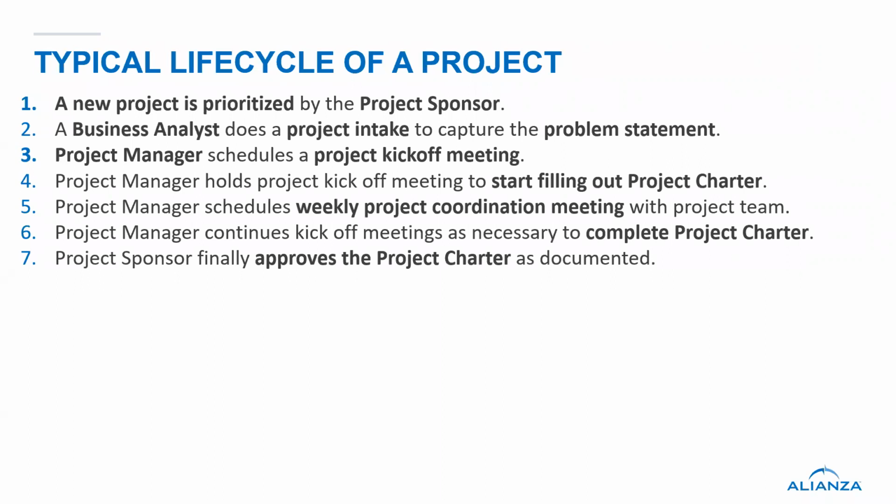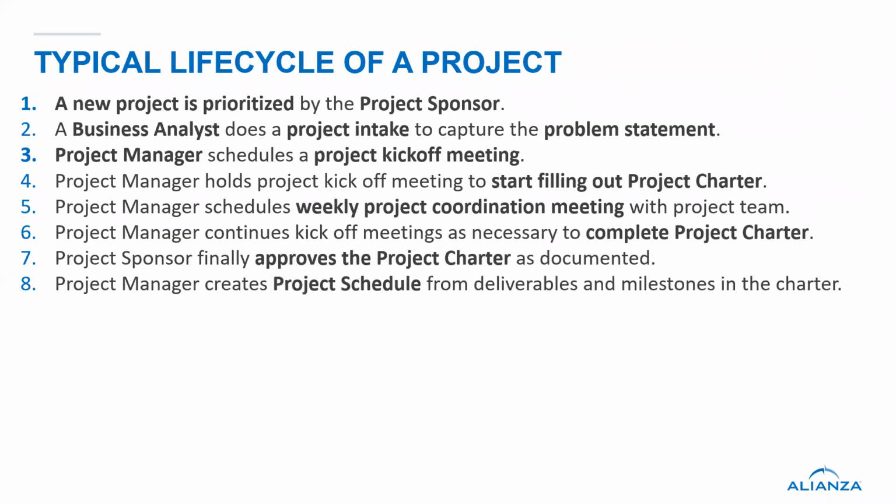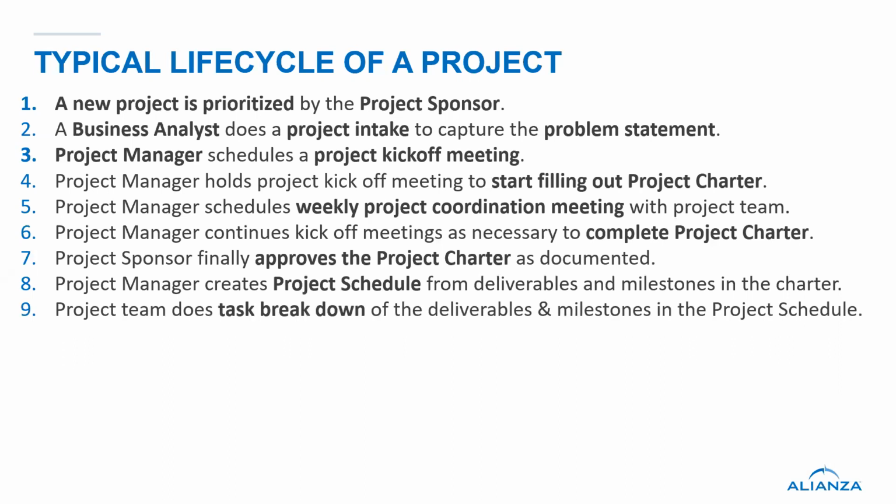Project sponsor finally approves the project charter as documented, once they give their stamp of approval. Project manager creates project schedule from deliverables and milestones in the charter. So we want to do these basic things. How do we make sure that we get all the tasks to get those deliverables and milestones done? Team does the task breakdown of the deliverables and milestones in the project schedule. So you've got the more robust project schedule. Now let's break it out and get all the tasks, the work breakdown structure, they call it.